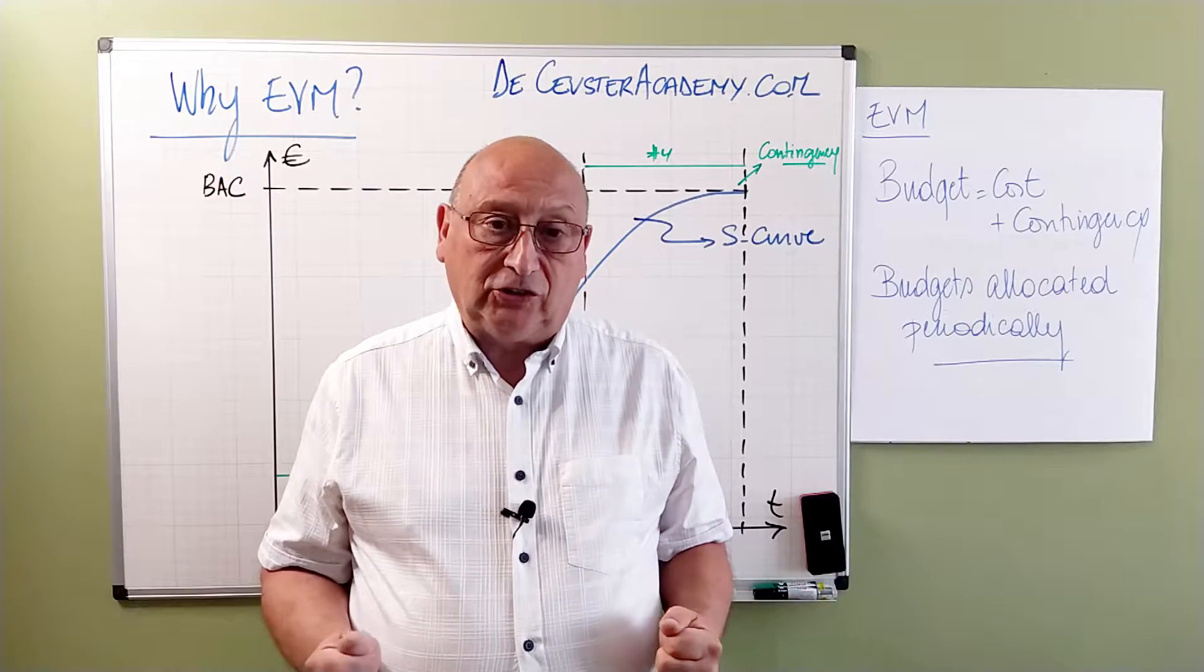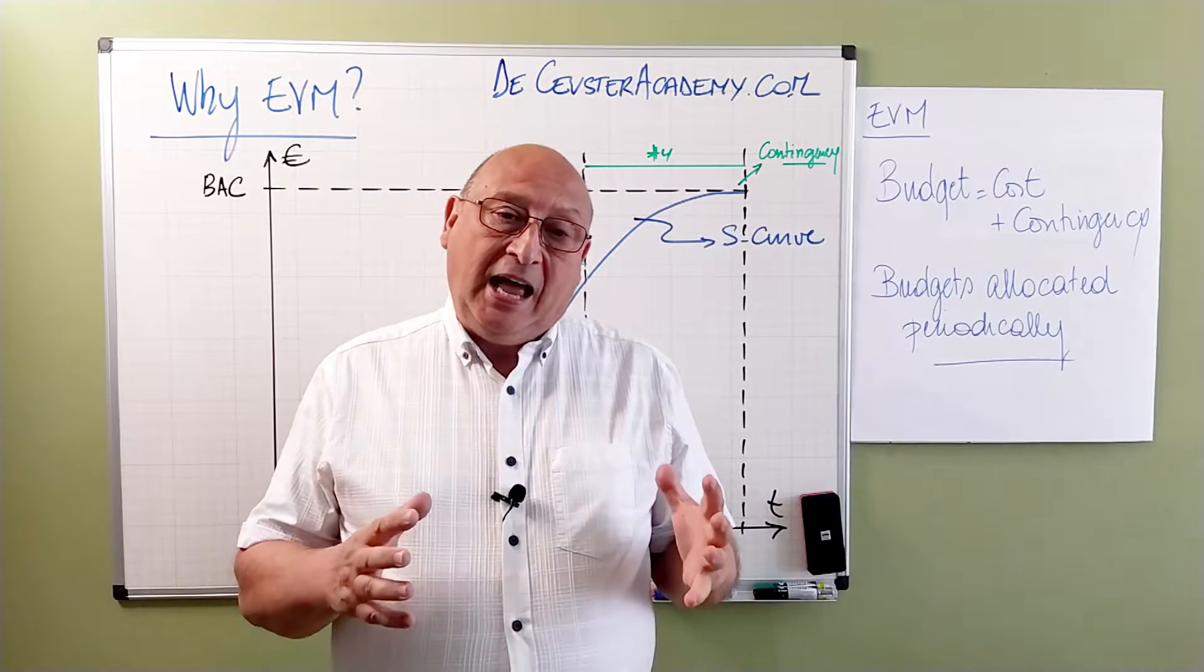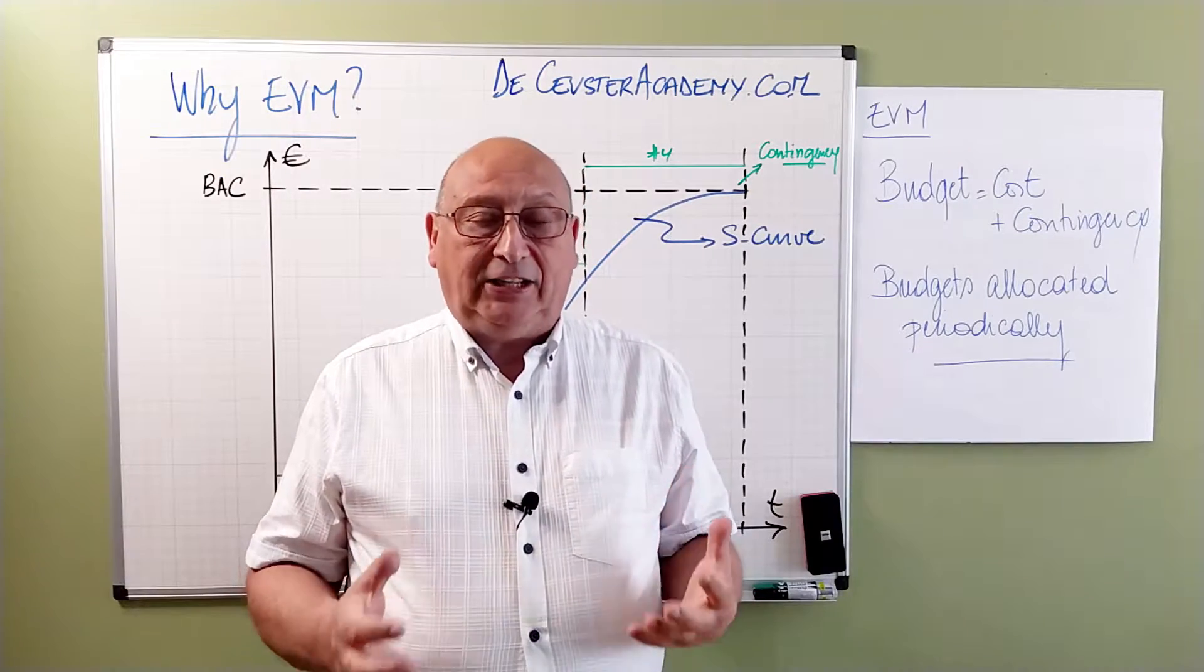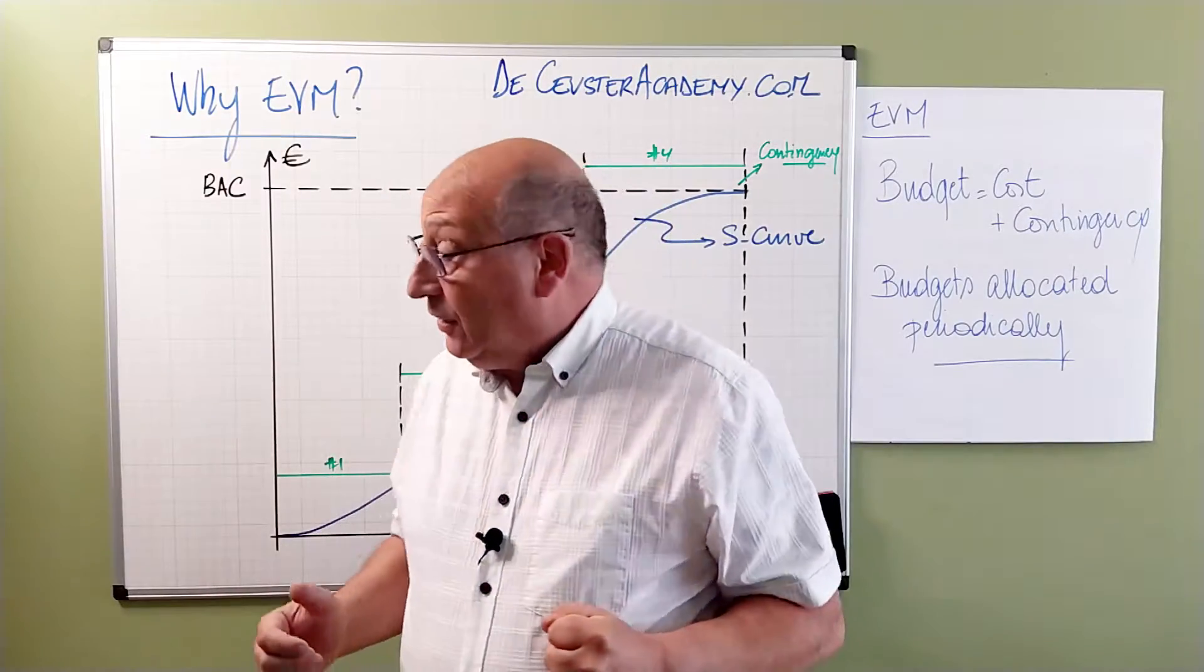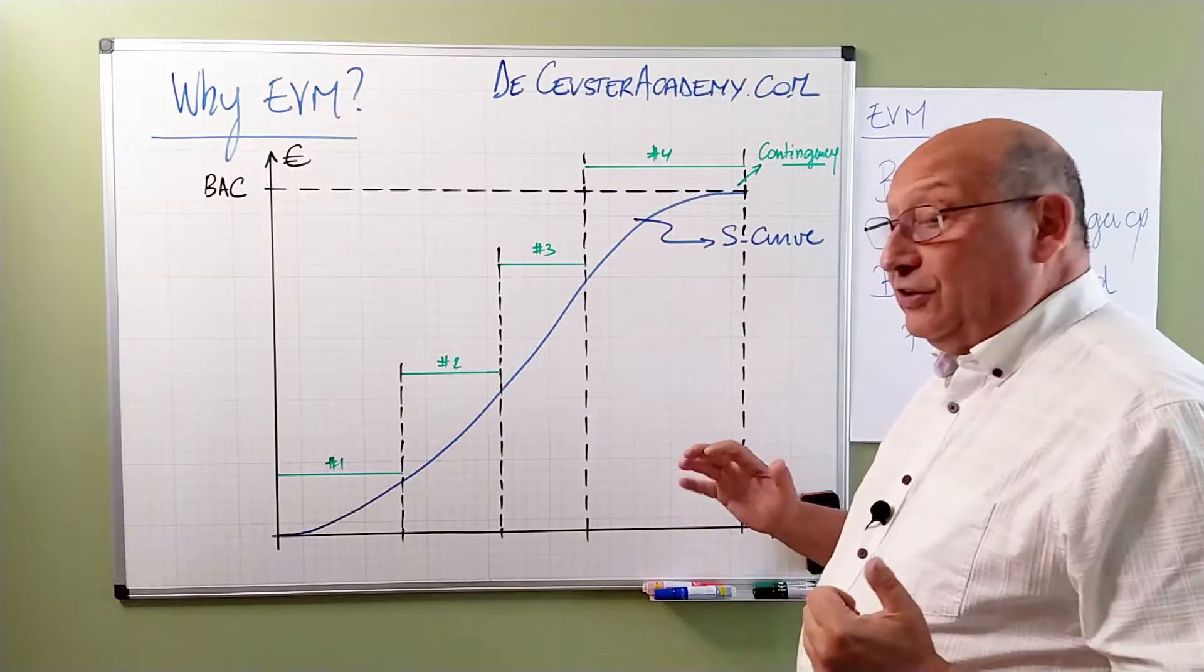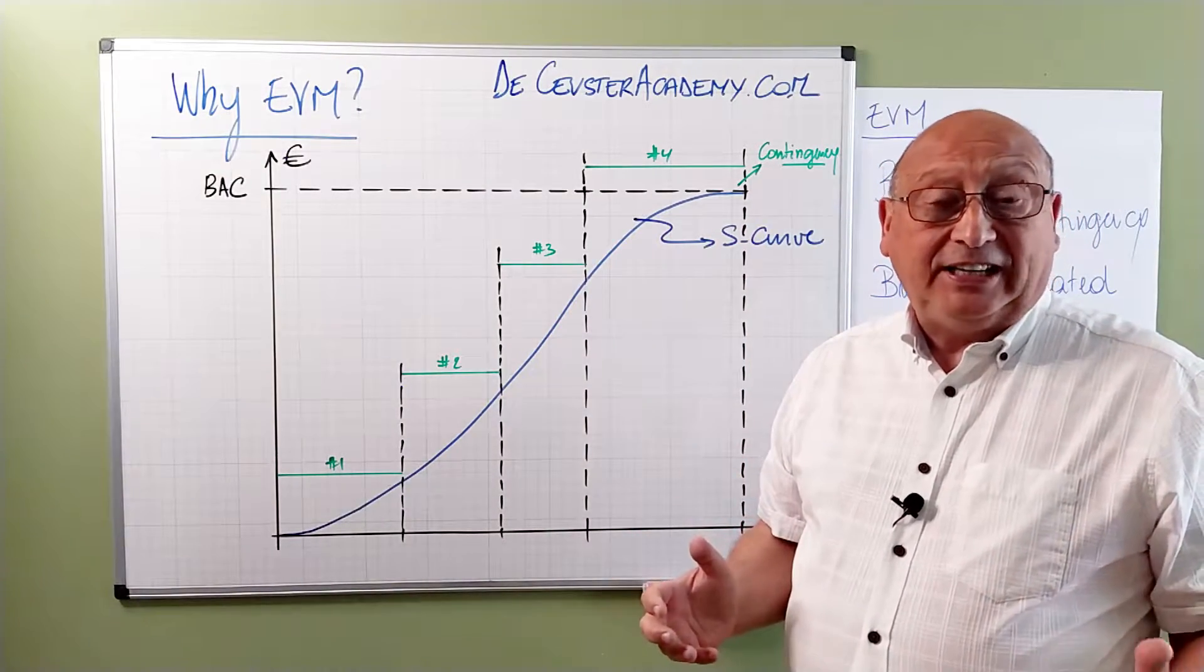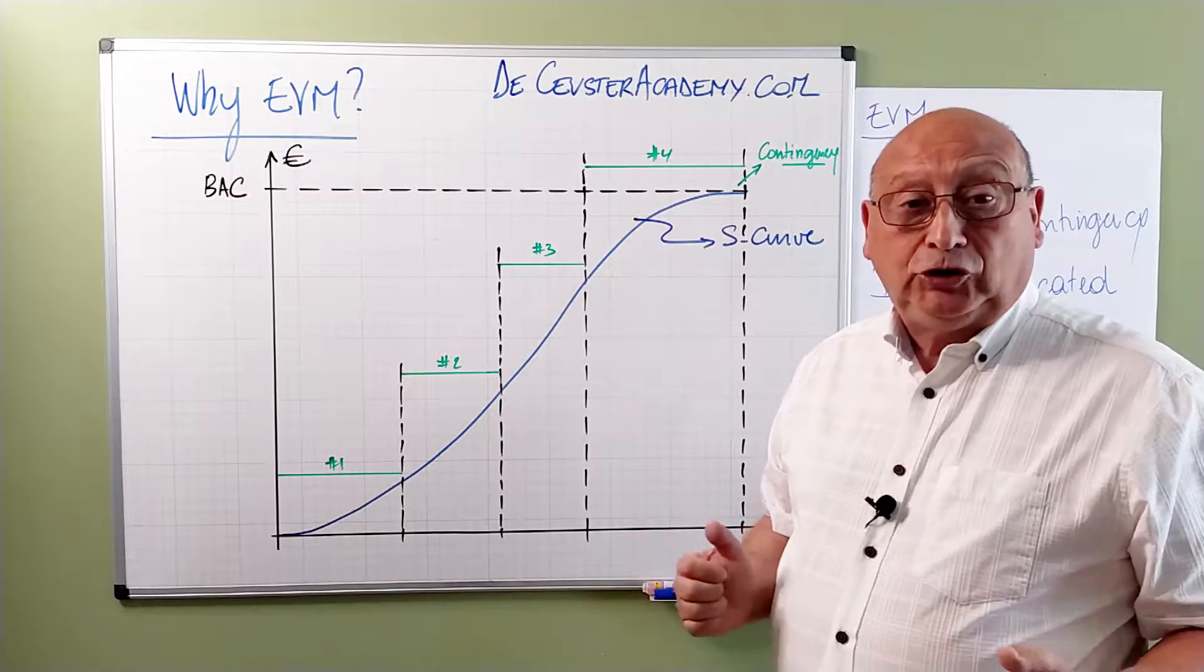In order to understand what happens once we have the project budgets, let's have a look at the S-curve or the cost curve of the project. Here on the graph you see the S-curve - the blue curve - which is basically an overview of the cost over the duration of the project.